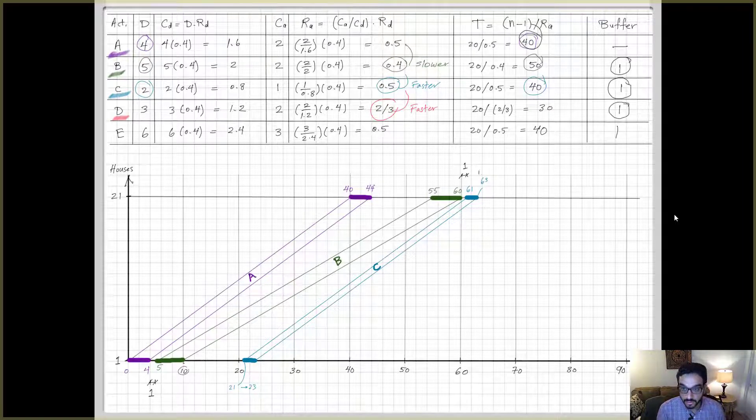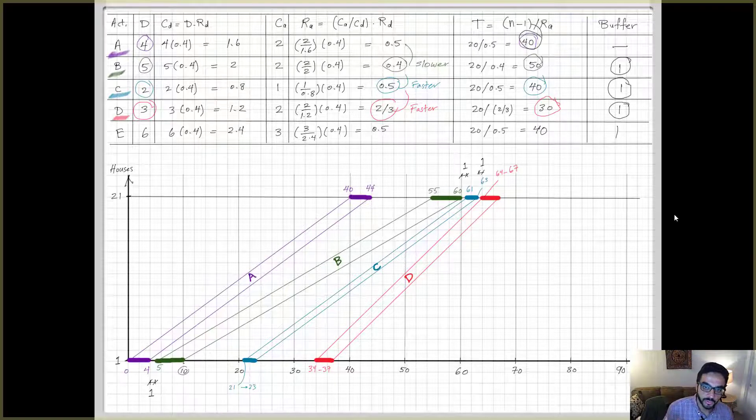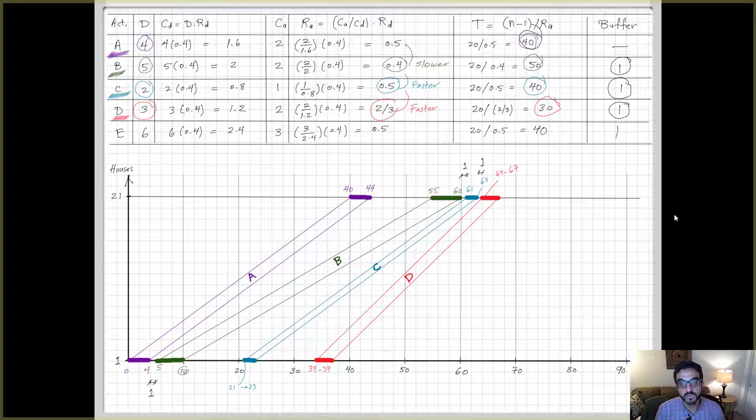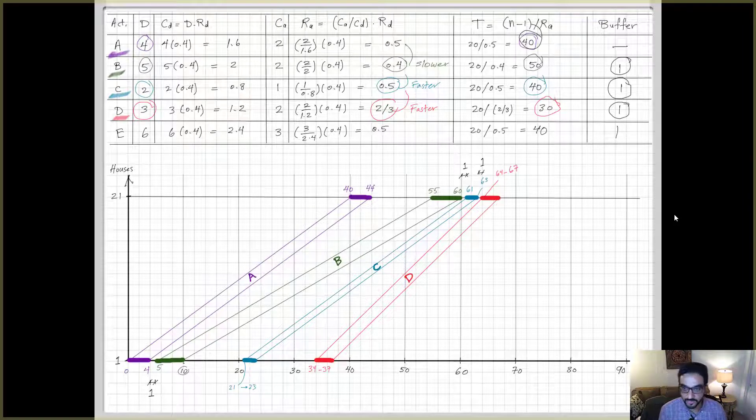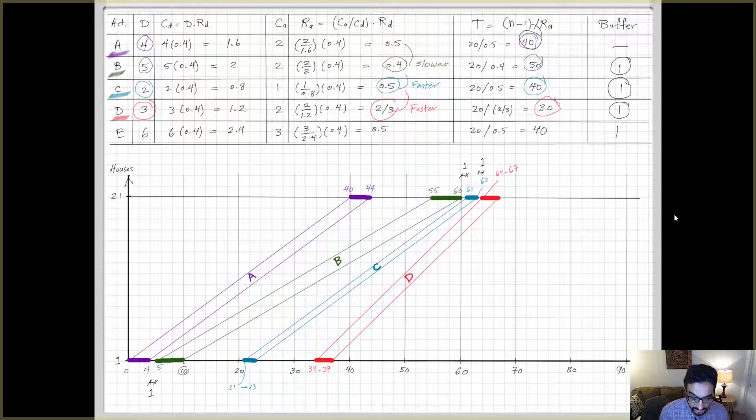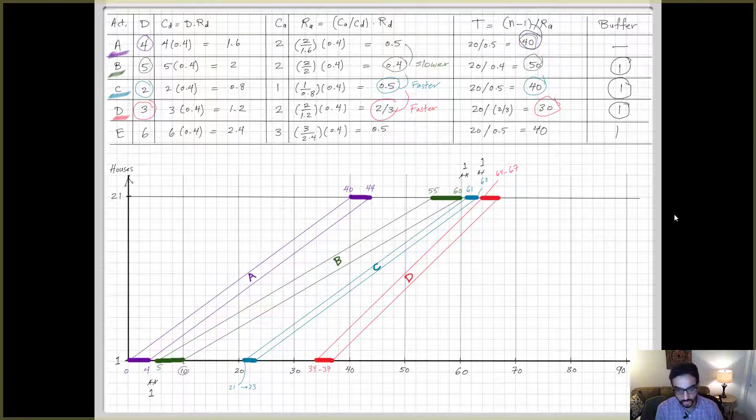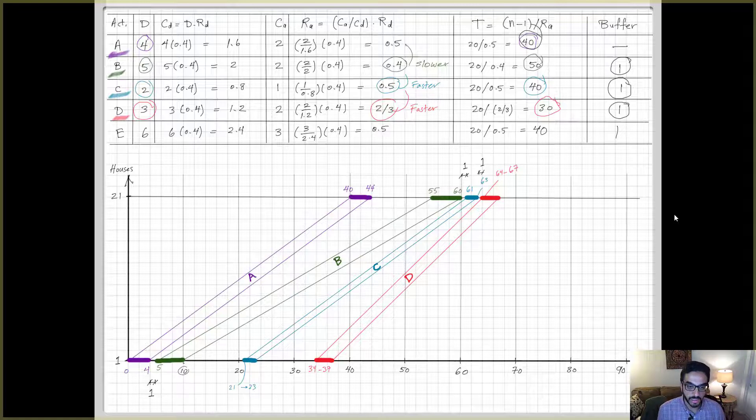Next would be D. You got the trick here. Compare the productivity rate, so you'll find that 2 over 3 is 0.667, faster than 0.5. So I'm hitting again at the top. Draw the one unit, one day buffer. 63 is the end of C, so the start of D at the last unit is 64 with a duration of 3, so it ends at 67. Considering that T here is equal to 30, you go backward with the difference of 30 backward in time. So the first unit for activity D here, the work starts at 34 and ends at 37. Draw the two lines, the bounding lines for activity D, and you're done with activity.